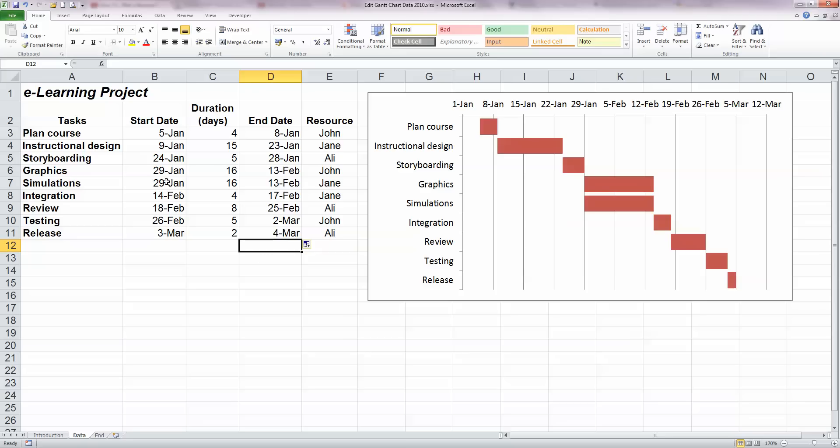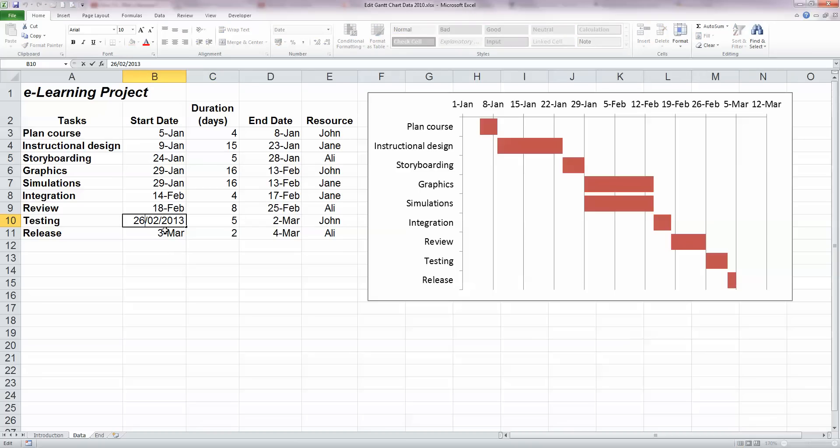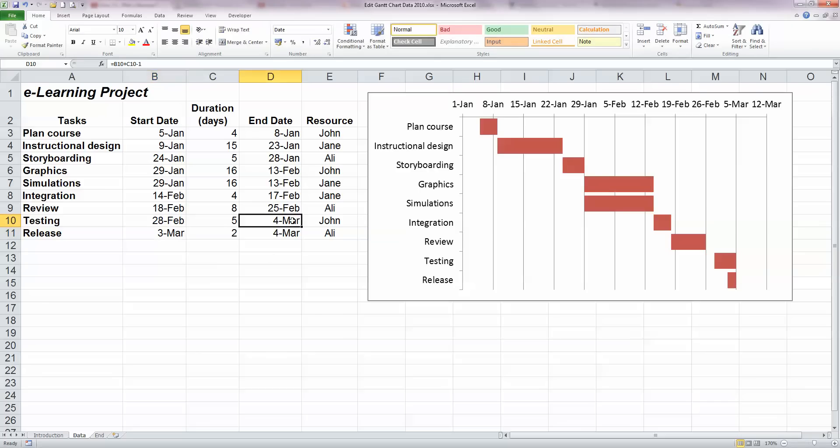So now if I change the duration, let's say I want to change the duration of the storyboarding task here from 5 days up to 7 days. We can see it ends on the 28th of January. So if I change it from 5 to 7, just type in 7 there, we can see that the end date changes to the 13th of January automatically. If I want to change the start date of a particular task, let's say I want to change the testing start date from the 26th of February to the 28th of February. So double click on that, and just change the 26th to a 28th. We'll see that the existing end date of the 2nd of March will automatically be changed to the 4th of March. So just undo that there. And this allows us to, if we change the start date or the duration, our end date is automatically updated.